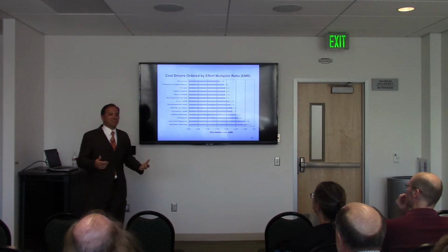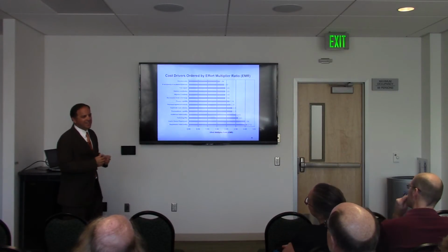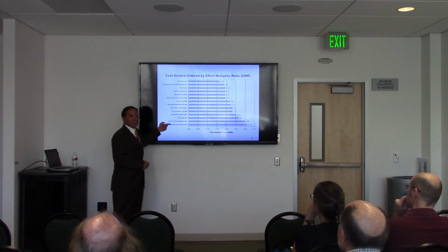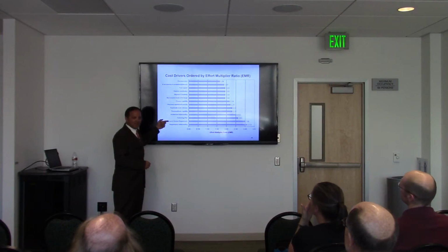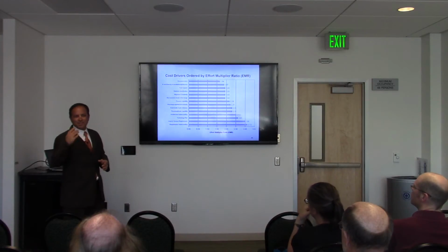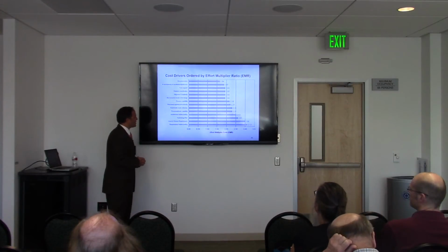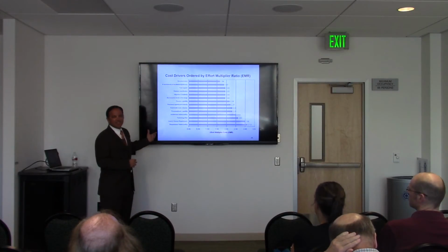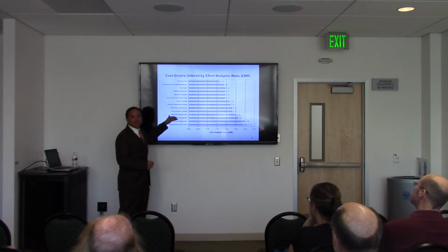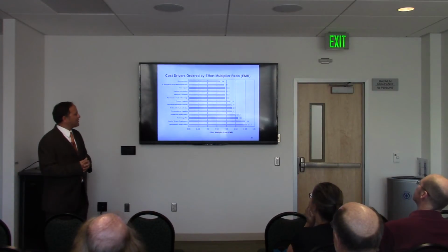Documentation is not going to kill your project. Maybe it will increase cost. Maybe it will provide some productivity, but it's not going to kill your project if you skip documentation. But if you skip this stuff, your project is dead. Level of service requirements, those are the ilities: survivability, interoperability, manufacturability. The more of those that you have, the more expensive your project is. So from a risk management standpoint, we have to take care of these big ticket items first, and not worry about the stuff on the top because it's not going to make or break your project.